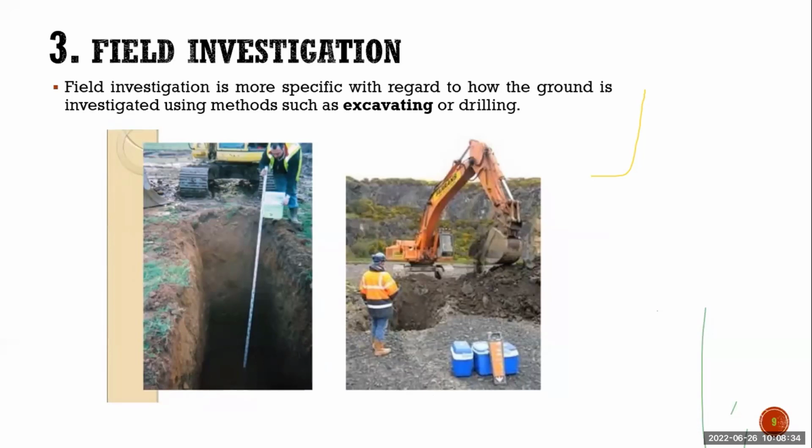Now, you should remember two things. Either it can happen the way I was mentioning, the client's engineer will send the details to the geotechnical contractors, and they will send the quote, and we will select one of the geotechnical contractors. Second, instead of contacting through the engineer, the client can directly approach the geotechnical contractors.